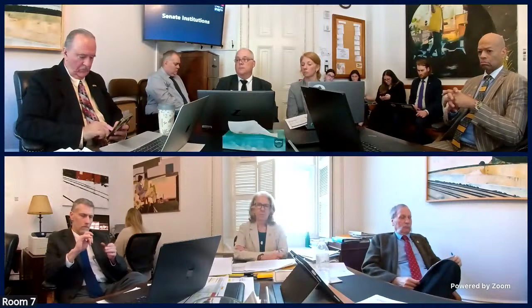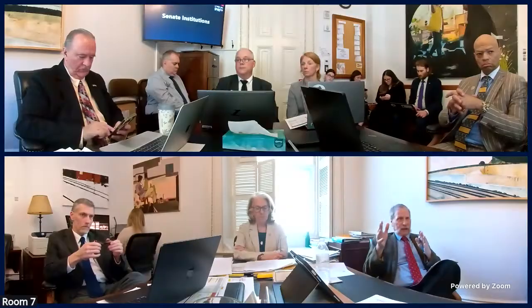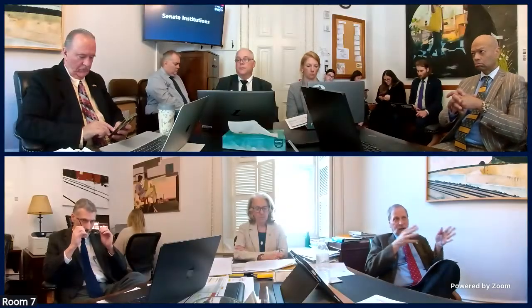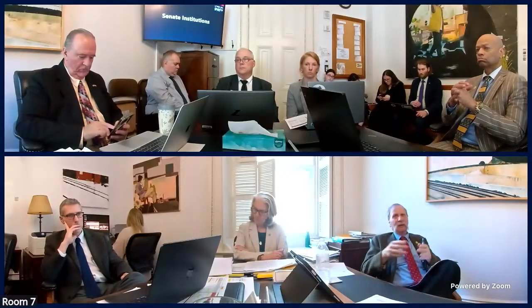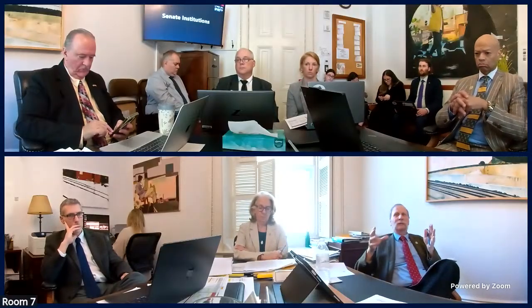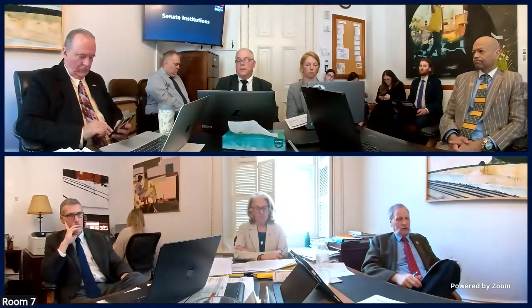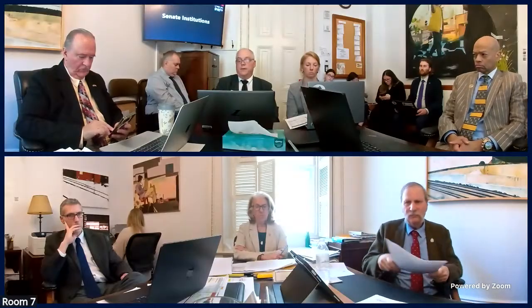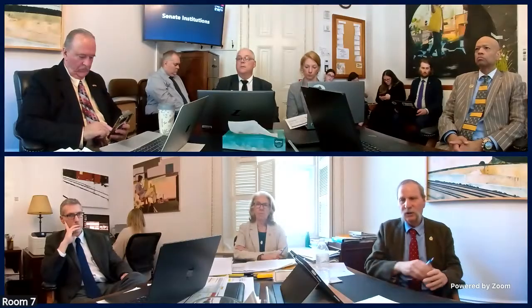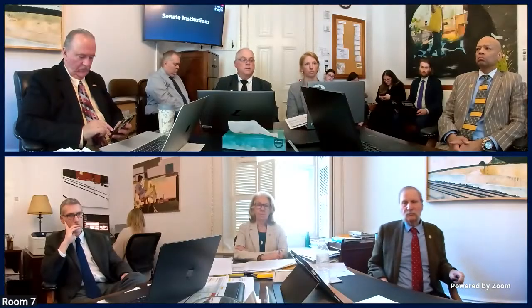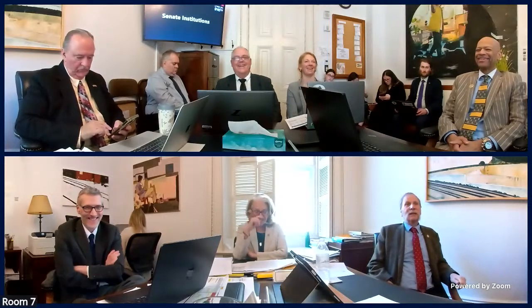And I'm trying to understand what the potential ramifications of not having that $500,000 are. If we can still move all the projects we're ready to go with forward, or whether that takes one off and puts it on the shelf for another year. That's correct. And sitting on the shelf for a year will increase costs. Sure. Labor rates will go up. Absolutely. Definitely. Sometimes there are spikes in things too.